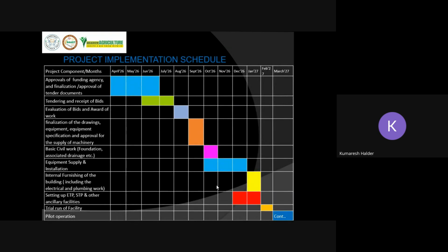Now you will see, we have planned that project and prepared the DPR; how are we going to implement it? You need to give a total timeline: when you want to start after getting the fund, and by which time you want to complete which activity. That should be written clearly in the project implementation schedule, so that the financial institution or scheme handling agencies can understand how you want to implement that project.